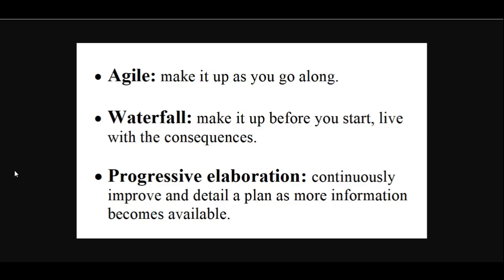For Progressive Elaboration: it involves continuously improving and detailing a plan as more detailed and specific information and more accurate estimates become available. Progressive Elaboration allows a project management team to define work and manage it to a greater level of detail as the project evolves. Some tasks and scopes may not be known in advance, which leads to some uncertainty in completion time. As the project progresses and more tasks are completed, the uncertainty for the completion time is reduced.